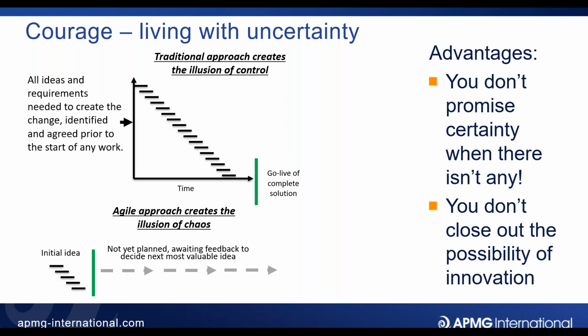Instead of gathering all the requirements up front and creating that complete plan, and showing how they're going to be delivered. That looks and feels very comforting, actually, because if I can draw the journey from end to end, it looks like I'm totally in charge of what I'm doing, and that gives out a certain confidence. But of course, the opposite of what we do in terms of change, instead of gathering all the requirements up front and creating that complete plan, what we do is we concentrate on the most valuable changes. And once those are up and running, we move on to the next most valuable piece of work. And it does take courage, because it looks like we don't know the whole story. But what it means is, of course, that we are being authentic. We're not promising certainty when there isn't any.